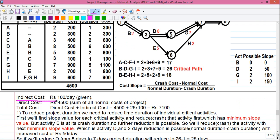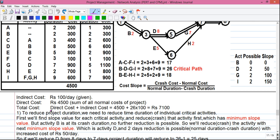The indirect cost given in the question is 100 rupees per day. The direct cost is 4500 rupees — the sum of all normal costs. So the total cost equals direct cost plus indirect cost: 4500 plus 26 days × 100, giving us a total project cost of 7100 rupees. We will now try to reduce this.